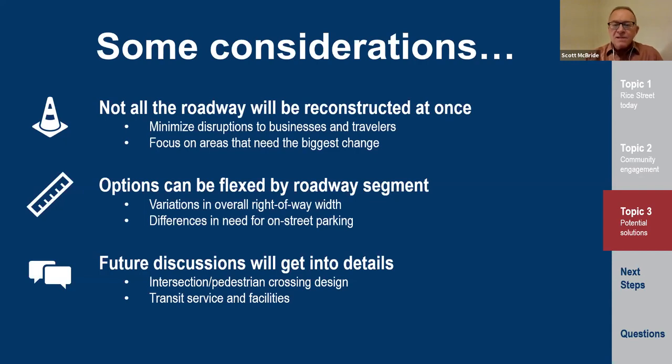In order to minimize disruptions to business and travel out there, focus in on the areas that really need the biggest change, we anticipate that you could see something like a portion of this corridor being reconstructed, others being upgraded, call it restriping, and kind of wait for their turn. So it's not necessarily this whole corridor going to be reconstructed at once.